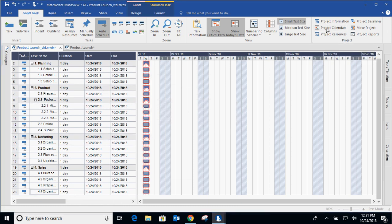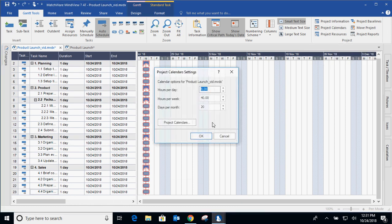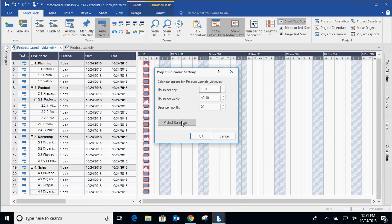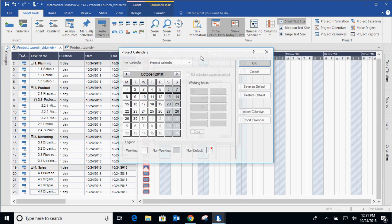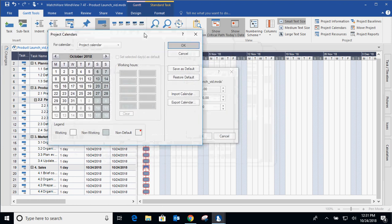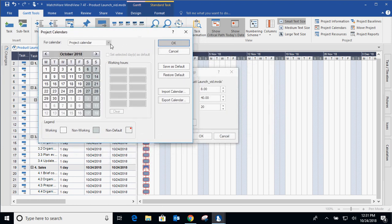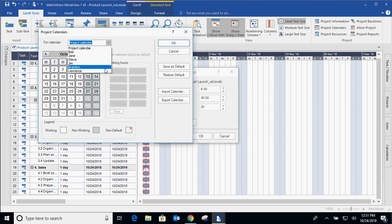Now going into project calendar, you can determine your calendar. A default calendar is a five-day, 40-hour work week. But again, that depends on what your industry is and that's all customizable. Not only can you get into project calendars as a whole, you can also get into resource calendars and we'll be covering resources a little bit later.